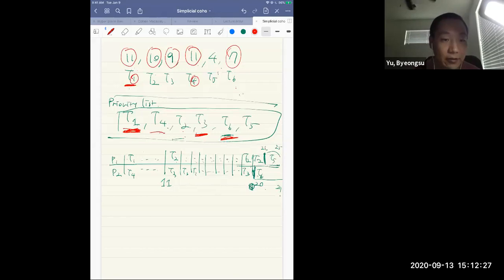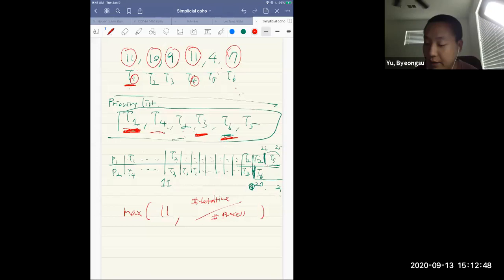The next question: is the schedule optimal? Again, put the longest time task on one side, which is 11 in this case, and the other one is the total time divided by the number of processors. So in this case, total time divided by processors is,